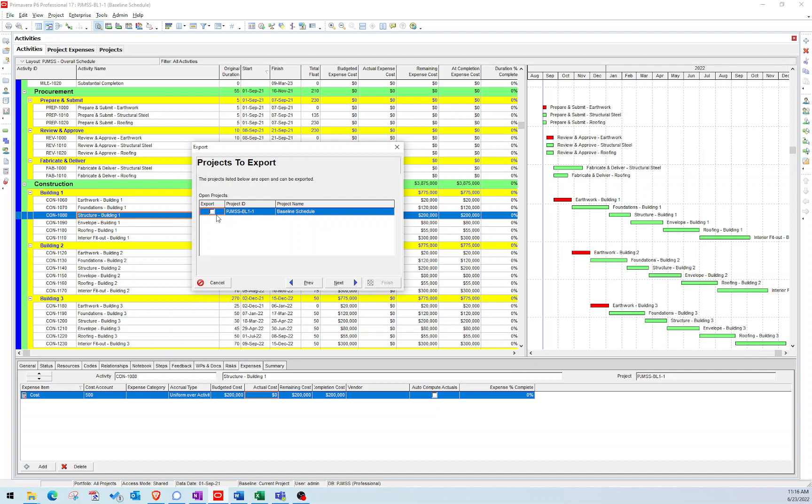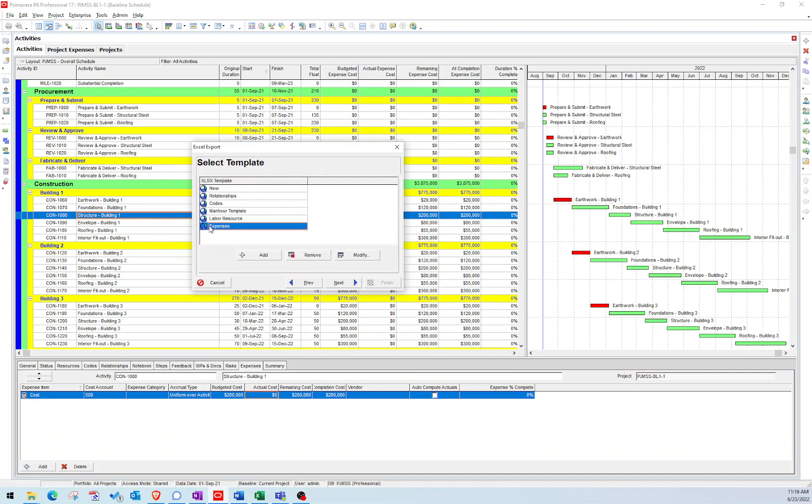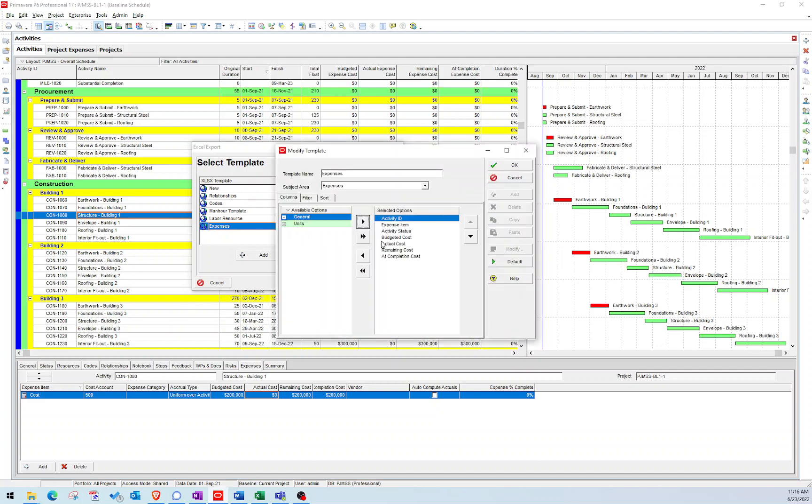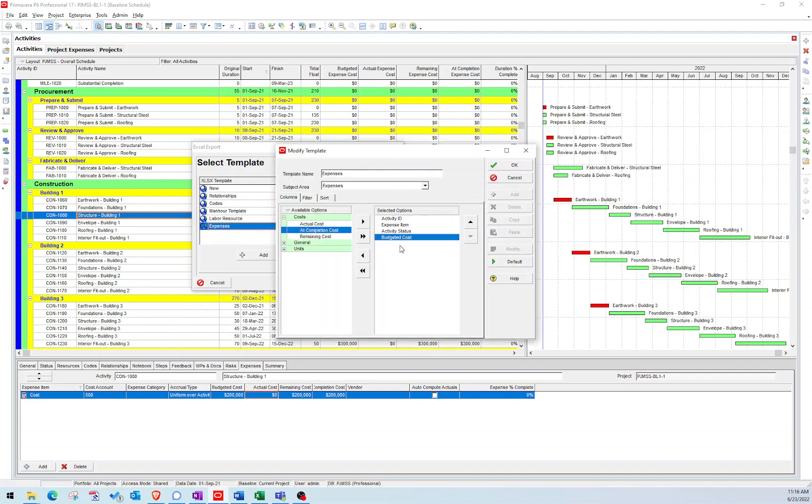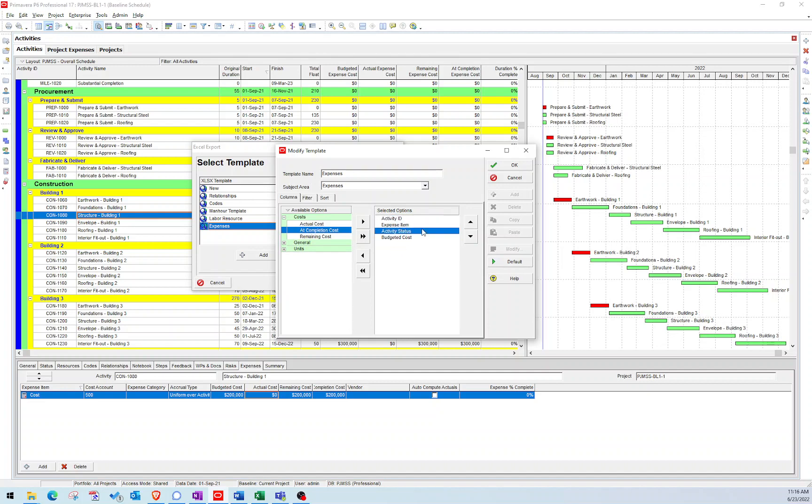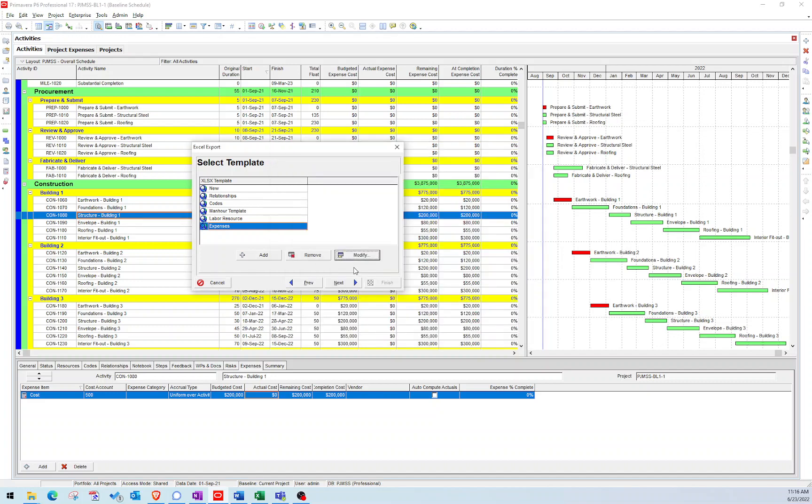I created this template called expenses, but if we modify that, really the only thing that we need is the activity ID, the expense item, and the budgeted cost. I would get rid of activity status because I don't need it, but it doesn't allow me to do that.